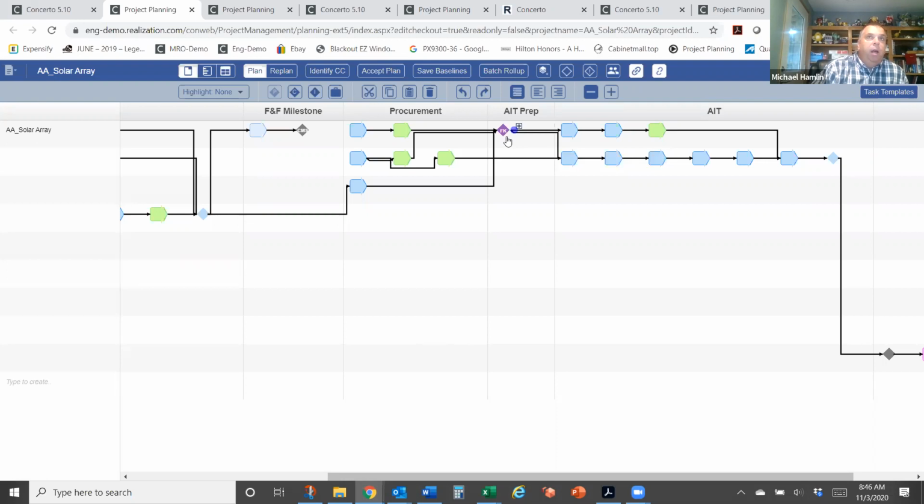Let's say you have an ERP system where you're tracking all of your materials that you're buying. The full kit can link into or integrate with that ERP system, identify all the different materials that you're buying, and first it can feed to the ERP system, when do I need these to be able to do the assembly on time? And it can be receiving from ERP, when are the materials going to be arriving, so I can see if there's going to cause any delays in my project overall.